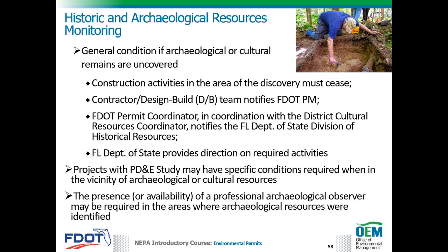For projects where the PD&E study identified the presence of archaeological or historic resources, the state ERP and/or the core or state dredge and fill permit may also contain a set of specific conditions. These conditions identify any actions that FDOT is required to perform when constructing in the vicinity of an archaeological or cultural resource. If a PD&E study was not performed, any archaeological or historic resources present in the project corridor will be identified during the permit application process.